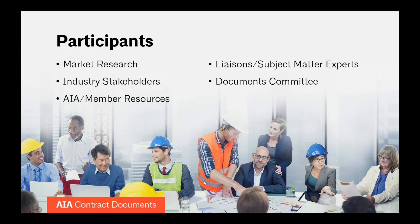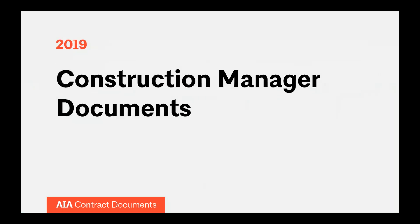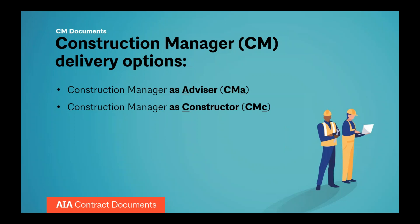Now Arlen will give you an overview of the construction management delivery method. Owners now have a much wider choice of construction delivery options beyond traditional bid. Nearly three-quarters of project delivery decisions are made before design begins, when owners are able to weigh the advantages or disadvantages of potential construction delivery methods. Alternative delivery options like design-build, construction manager as constructor, and construction manager advisor — which we'll call CMA for short — have become much more attractive to owners that want to reduce disputes and claims as well as obtain better budget and schedule results.